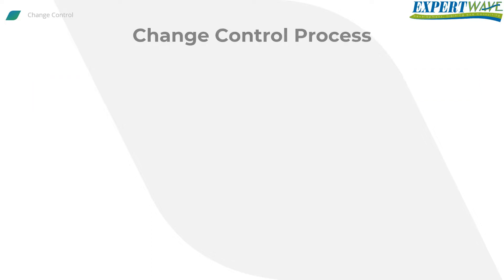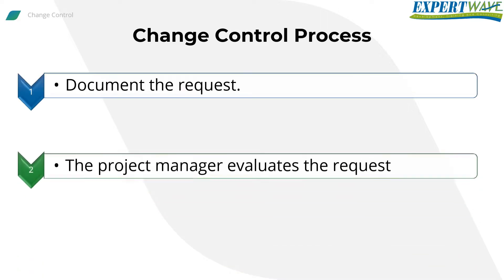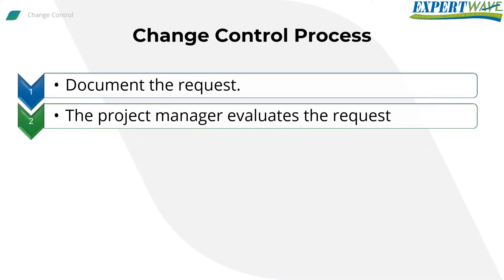The customer, or whoever needs the change, documents the change request in an email, a form, or better yet a database system that holds all the requests. The project manager then evaluates the request to determine whether it is aligned with or against the project objectives.